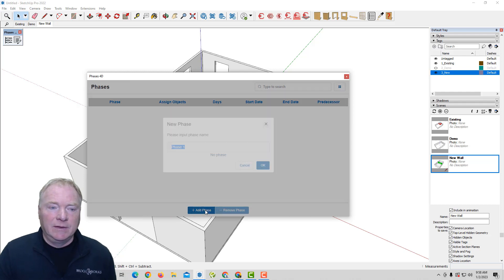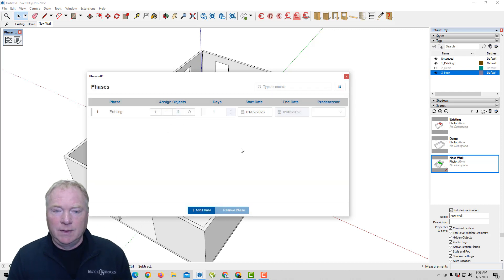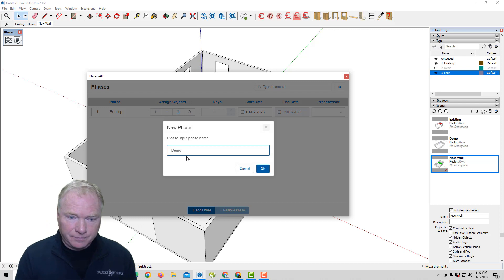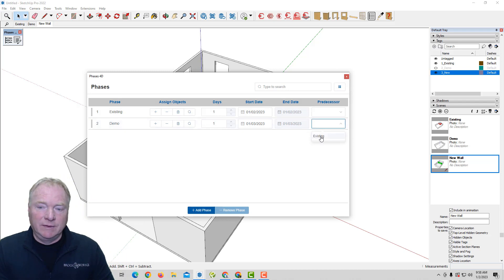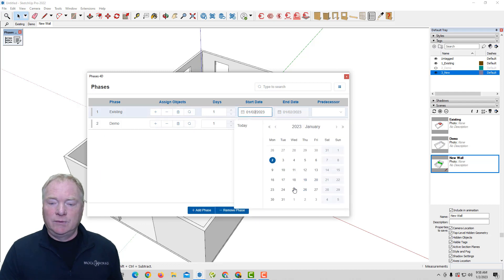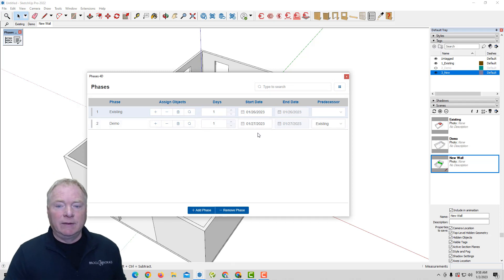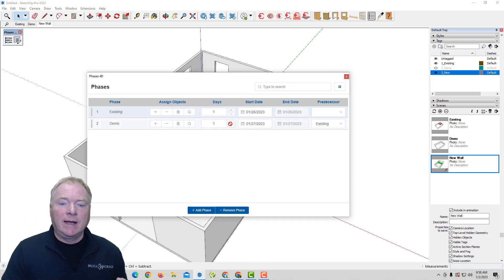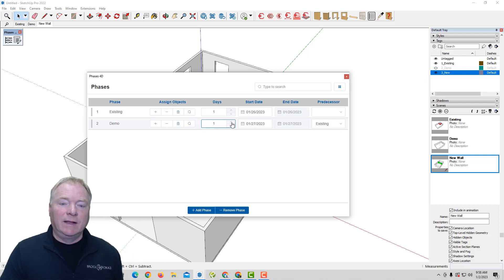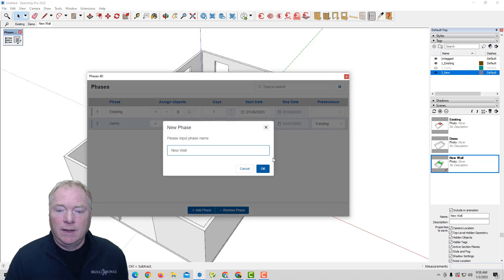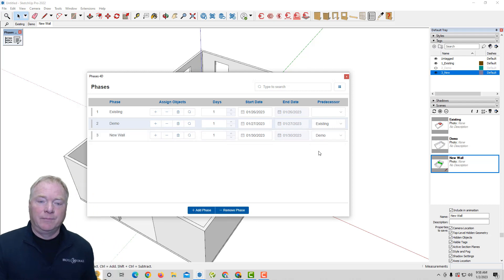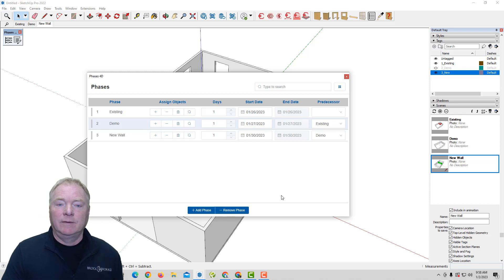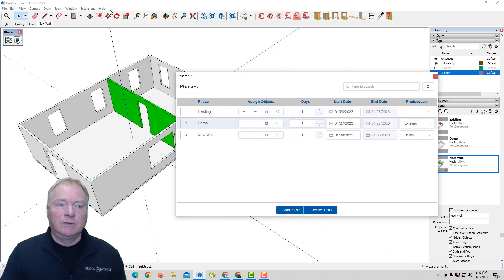So I'm going to come in and say that let's do existing is the phase one. And then I'm going to add a phase that is demo. But I'm going to make the predecessor of the demo phase to be existing. So one can't happen before the other. So watch if I change the start date to, say, the 26th. Now you'll see that's on the 27th for demo. And I could put the duration of days. I can click through here the number of days I want. Simple one like that. Just a one-day job. And then I'm going to add a new phase called new wall. And I'm going to have the predecessor for new wall be after demo. And I'm going to give that a one-day duration as well.